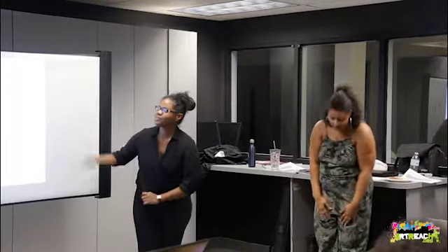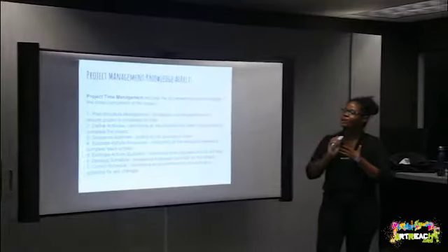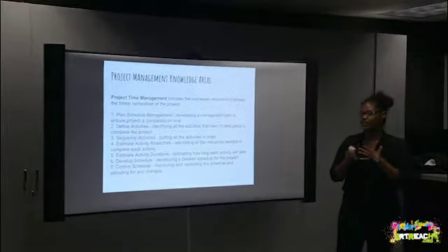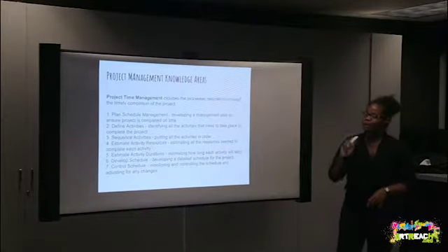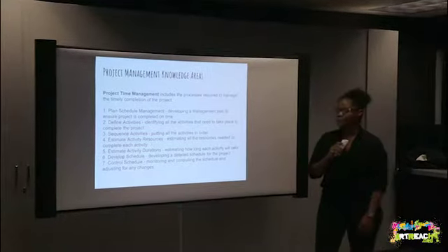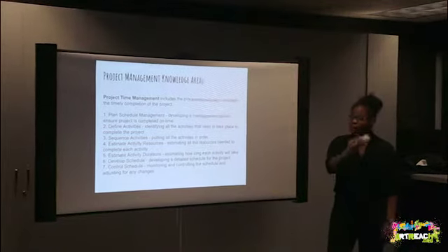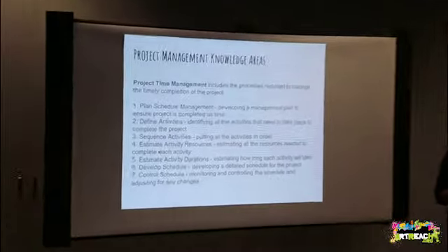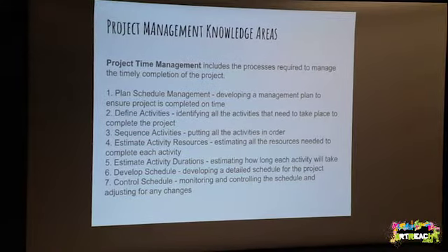Okay, so project time management. I like time management. It includes the processes required to manage the timely completion of the project. One, plan schedule management: developing a management plan to ensure the project is completed on time. Two, define activities: identifying all of the activities that need to take place to complete the project. Sequence the activities, so you're putting them all in order.